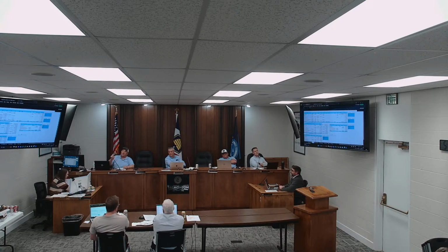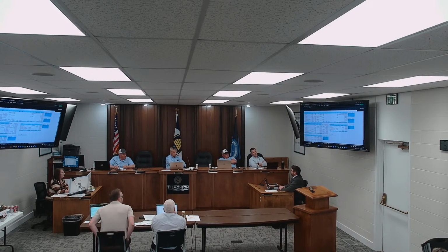It's the other hard part, to guess three years out what a station's gonna cost. Figure 3% a year, so in three years it's gonna be 10% more. Well, 9, but 10%. But if you had the property, at least you're moving forward. Exactly. And again, the property values in particular are growing faster than almost anything.